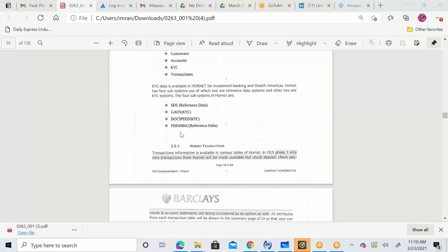So I went back to my business, told them that out of 2.1 million customers, around 400,000 have social security, and 1.7 million customers are missing social security. Do you still want to bring it? They said, what is the alternative? So I went further into this table and saw that tax ID number is also available, and that is available for every single customer. So we brought both the social security number into the application as well as the tax ID number.